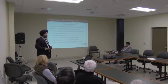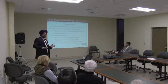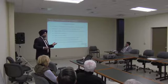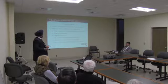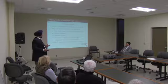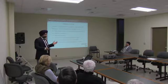So I'll go into a little bit more detail on the phases of the project, what happened in each phase. Phase one was mostly mobilization and preparing the ground for building these facilities. Phase two, we are building the facilities on the available ground. To name a few, there's the groundwater flow control and metering facility, ozone contactor, flash mix system, flocculation sedimentation basin, and wash water recovery facility. Phase three, we will be demolishing the existing clarifier. I'll show you the picture in a few.